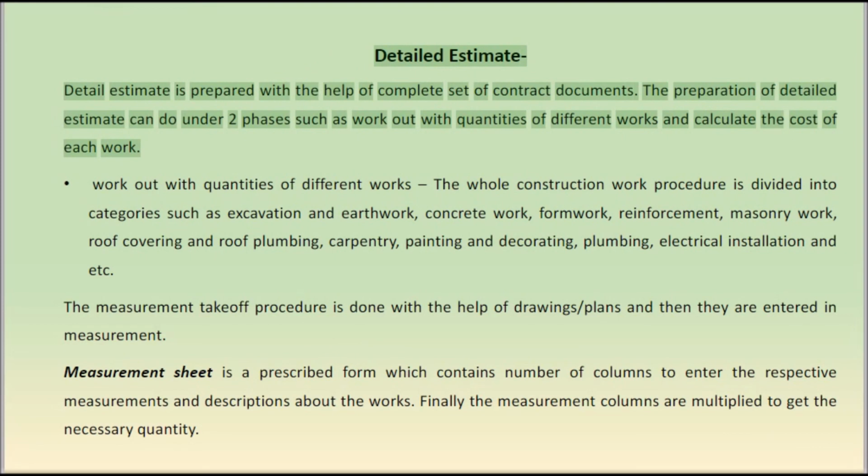Detailed estimate. A detailed estimate is prepared with the help of a complete set of contract documents. The preparation of a detailed estimate can be done in two phases: working out the quantities of different works and calculating the cost of each work.